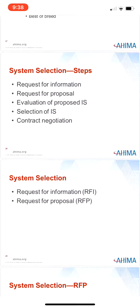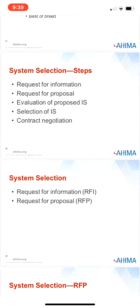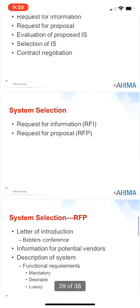The request for information, or RFI, is a formal document requesting information on an information system. The RFI asks the vendor for basic information about the product and how it would meet the requirements outlined in the RFI. The RFI can be used to select minor information systems, or the information gathered can be used to determine who will receive the more rigorous request for proposal, or RFP — the type of business correspondence asking for very specific product and contract information sent to a narrow list of pre-selected vendors.